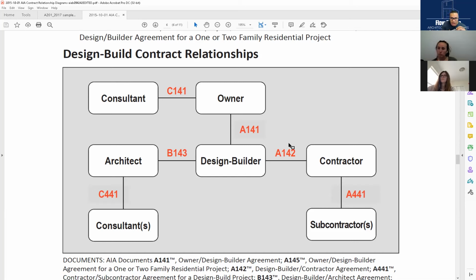I failed. That's my failure right there. The cost and time and money on that is on me. I got to pay for that. But the labor to level the floor all throughout the whole basement should have been done. That's the concept of betterment. I don't know if you've heard of that concept, but it's something that should have been done anyway had she approved the change order. I actually just got a voicemail from the client right now as I'm talking to you about this. I'm sure she's yelling at me.